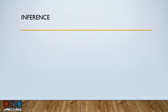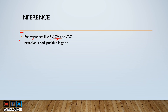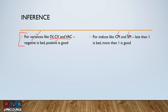A helpful inference to remember: for variances — SV, CV, and VAC — a negative value is bad and a positive value is good. For indices — CPI and SPI — a value less than one is bad and a value greater than one is good. For TCPI, the opposite of the index rule applies: less than one is good (under budget) and greater than one is bad (over budget).